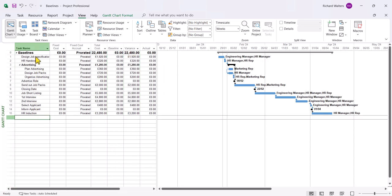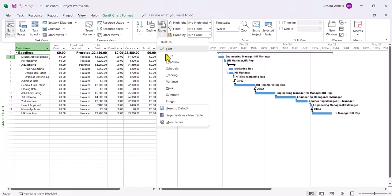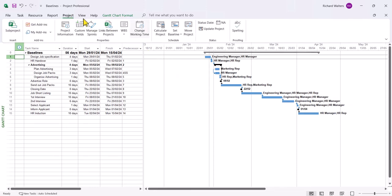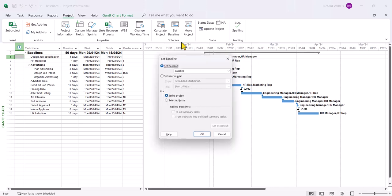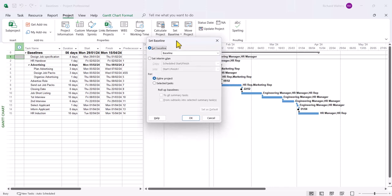Okay, let's have a go at looking at setting baselines. So it doesn't matter which table we're in, I'll change it back to entry table. To set a baseline, it's the project tab, set baseline, drop the arrow, set baseline. And nothing more than just, in effect, now just clicking OK. There's lots more you can do to baselines, but for this example, we're just going to click OK.